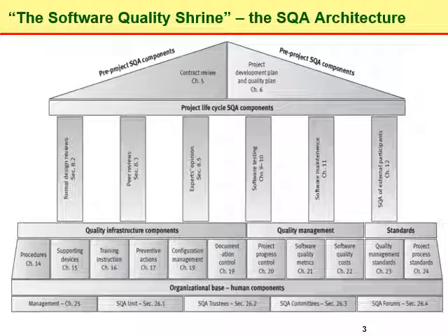Evaluation of the customer's capacity to fulfill their obligations, for example, financial obligations or any other obligations which might be imposed by, for example, seeking some licenses from the government agencies. So a checklist is often used by the review teams to ensure that these contractual obligations are met.